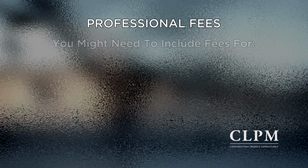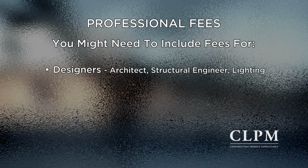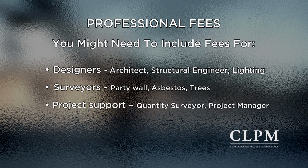Step 2 is then to break this budget down into 3 key headings. Remember, there will be costs outside what you pay your builder. The first one of these is professional fees. Fees to your architect, your structural engineer and party wall surveyor, as well as planning applications. And you may need to use a quantity surveyor or project manager as well.